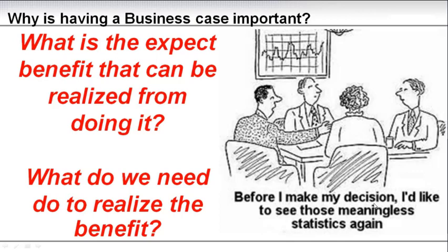But how do we realize the benefit? Well, you'll only realize the benefit if you then have your change management in place, so that the organization is also ready to start using this new SAP best practice process that you are building as part of your project. If you do not have that last piece in place, yes, you can complete the project on time and within scope, and you now have the best system in the world, but you will never realize the benefit from it because you haven't got the last piece in place.